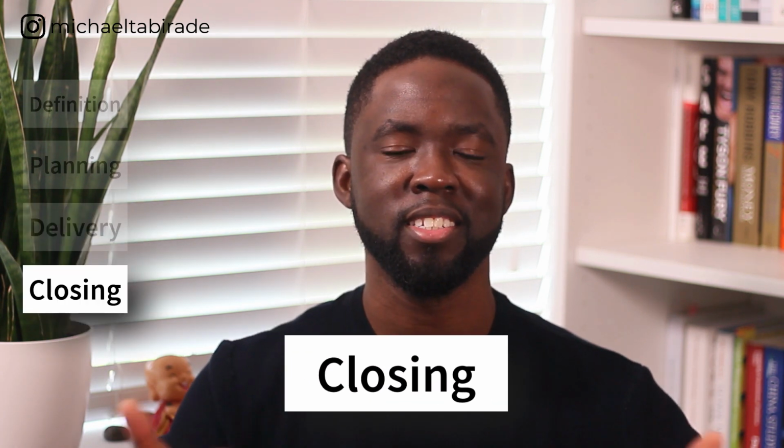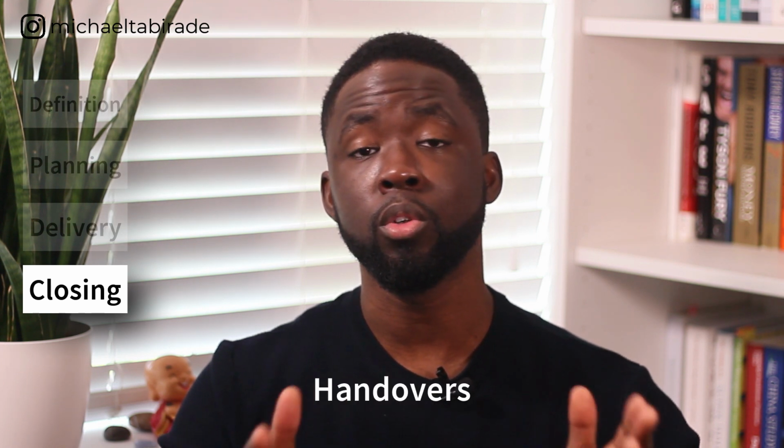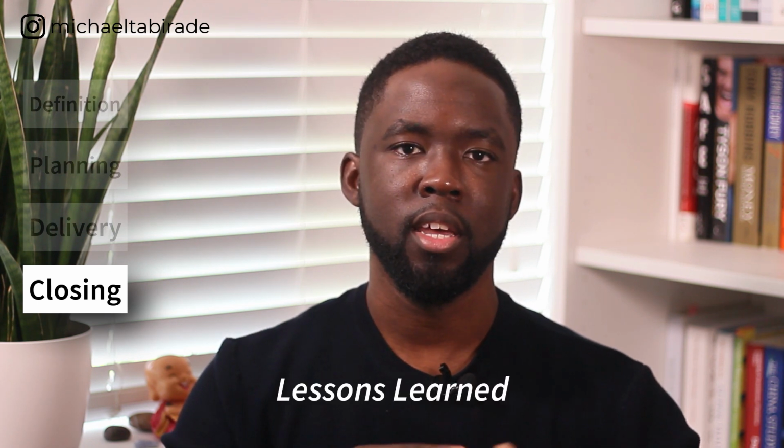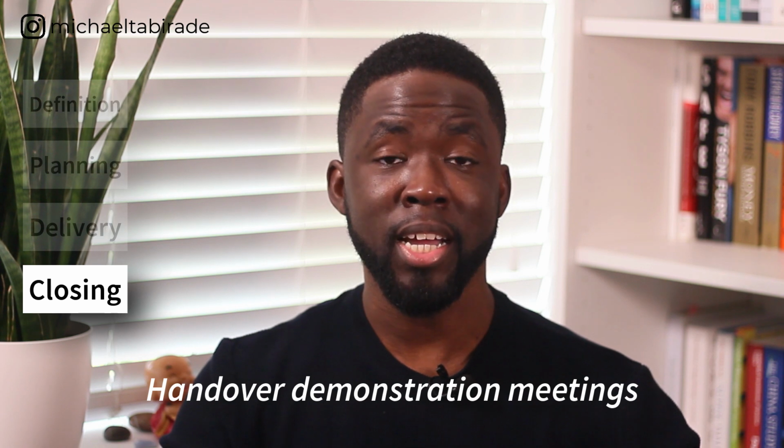The final stage is closing off. And this is essentially where you're focusing on handing over the information or the assets or documents to those who are going to be assuming business as usual or going to be using the service that you've implemented based on the project. And this is signified when you start handing this stuff over. Essentially, this is writing down, again, your lessons learned, any standard operating procedures. Maybe you're going to sit down in a couple of meetings to demonstrate what's actually happened and how to operate the service in a specific way.